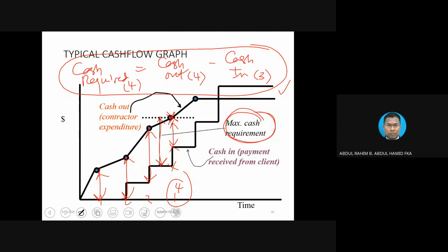Two questions from the final exam question, cash flow. What could be the other two questions? The other two questions could be asking you about this point, either value, which is at the top here, or cost. Based on the data given, this is just a bonus point. If the data is given based on cost, then of course you can calculate value. If the data is given based on value, you can always calculate cost based on this formula: V equivalent to C plus P. So now you can answer three questions already.